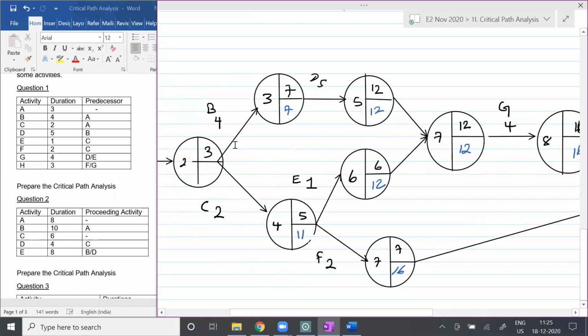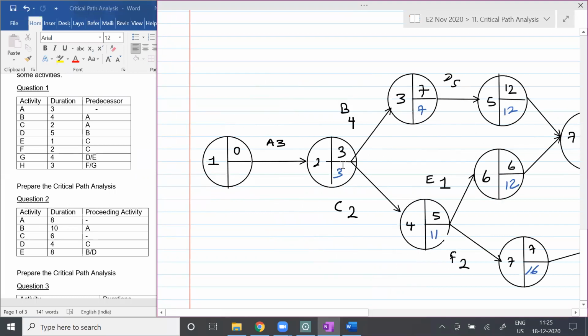Now here again an intersection. 7 minus 4 is how much, students? 3. 11 minus 2 is how much? 9. So which is the smallest number? 3. That's 3. And then, students, 3 minus 3 is how much? 0. Can you complete it, students?